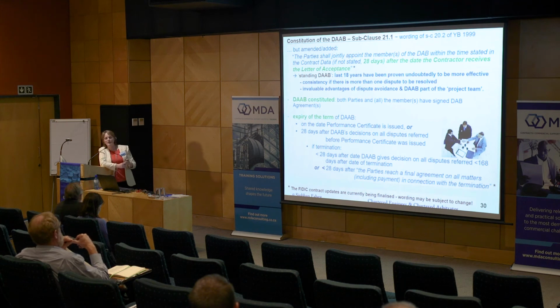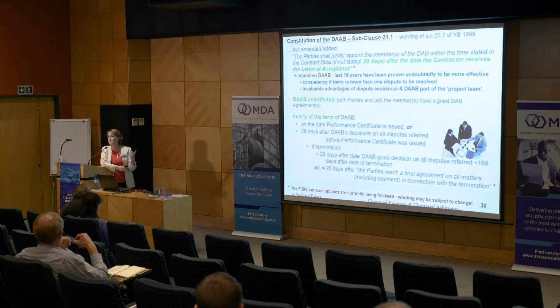And that's basically giving the authority to the FIDIC president, or whoever you'd like to name in your contract data, to make the decision for you, to appoint the DAB member if they're not agreed, and to decide how much that DAB member should be paid. Okay, so there's default provisions to make sure that nothing gets stalled on the way, and to keep things moving forward.